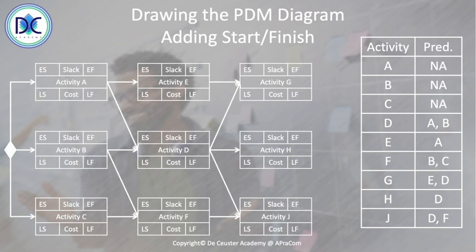so we have a common point where the diagram starts, and we do the same for the finish. It's not necessary, but many people like it like this, so it's not a problem, it's not wrong. It's just that in some cases people say we put an activity in the front which has a duration of zero duration, which means it is a milestone. When you put it in a software, we find in fact that this shows immediately a milestone.